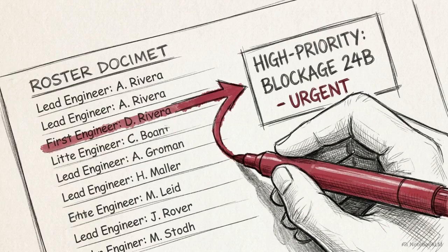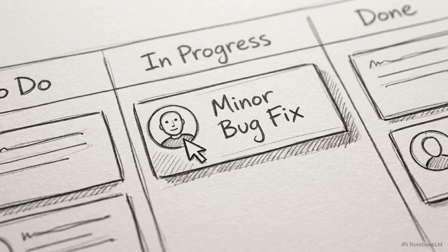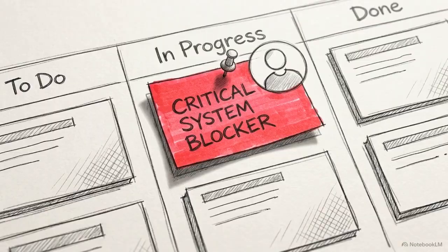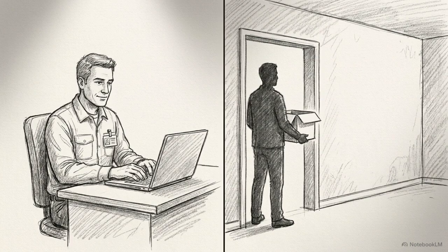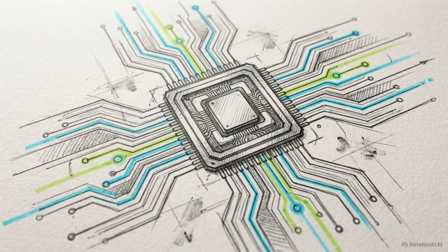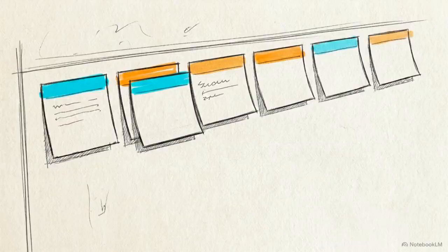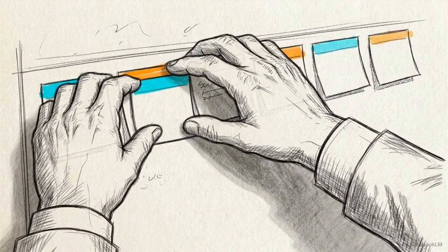Reallocate resources fast. Move your best senior engineers away from non-critical tasks and put them on critical blockers. Reallocating known talent is more effective than hiring new people because the existing team already understands the codebase and project requirements. The U stands for unbundling dependencies.